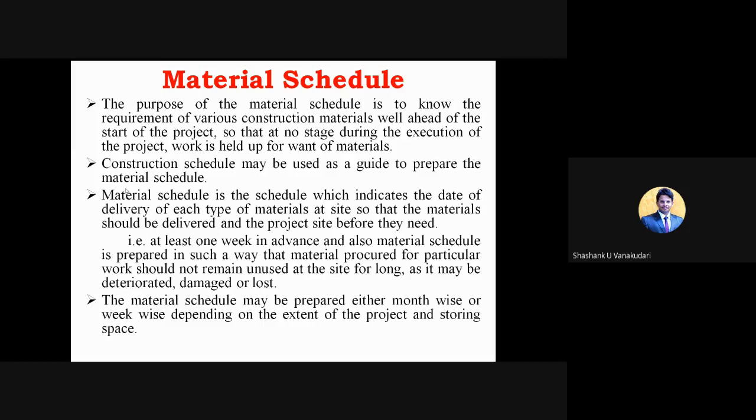Okay, that again depends upon the space availability in the construction site. If the construction site has large space to store the materials, you can prepare it month wise, or you can prepare it week wise, and for every week you purchase the materials before starting any activity, and then utilize them in the construction work.